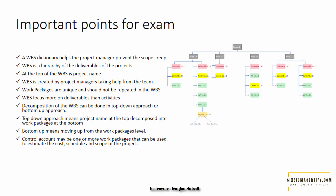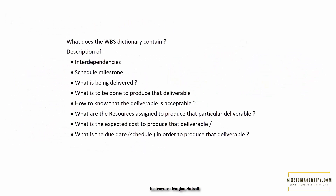Numbers are often seen in work packages, but they don't give detail on their own. To know more about the WBS work packages, we create a document that relates to the numbers assigned — the WBS dictionary. It contains descriptions of interdependencies between work packages, schedule milestones, what is being delivered, what needs to be done to produce the deliverable, acceptance criteria, resources assigned, expected cost, and due date or schedule.